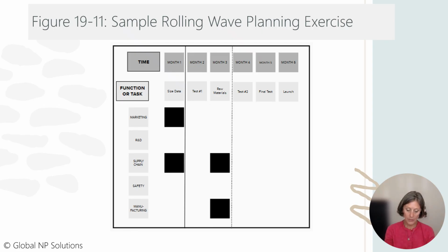Lean product development teams often track project risks on the team dashboard, adding the risk matrix of Figure 19-10 to the Scrum board. When the risk is no longer a concern, such as if a trigger event did not happen and cannot happen in the future, then the risk is removed. When a contingency schedule or budget item is associated with a risk, the contingency is also eliminated when the trigger event is passed and the risk does not come to light.